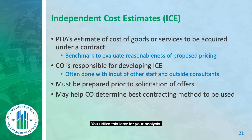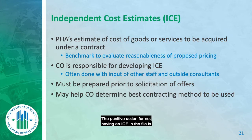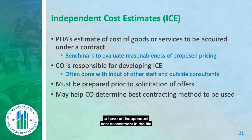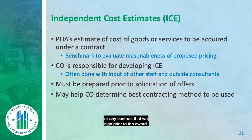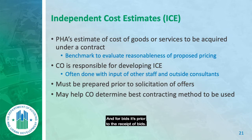You utilize the ICE later for your analysis. The punitive action for not having an ICE in the file is seizure of the funds. We must have an independent cost estimate in the file for every quote, bid, or RFP — or any contract we assign — prior to the award. For bids, it must be in prior to the receipt of bids.